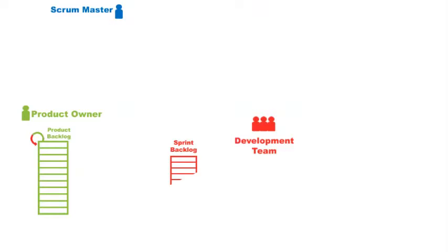The Sprint Backlog. The Sprint Backlog forms the plan of items the development team expects to deliver throughout the sprint. This may be broken down and described as tasks they intend to complete in order to deliver each product backlog item, or as tests that describe the work that must be completed so each backlog item can be considered done.